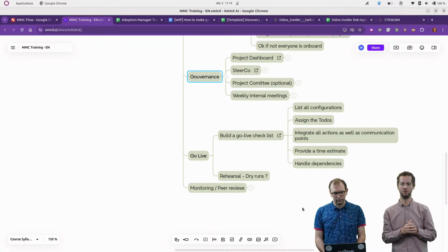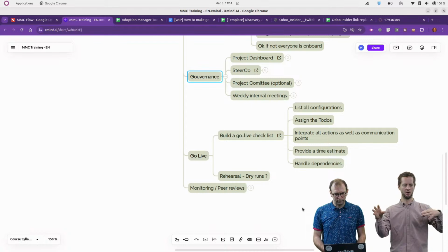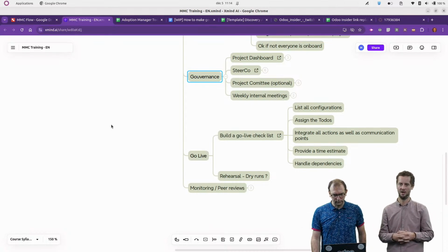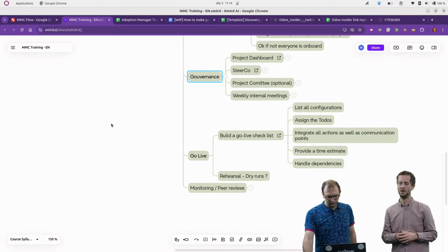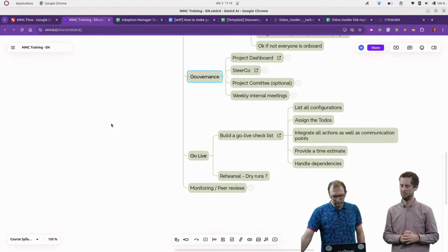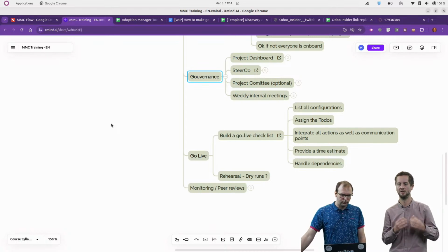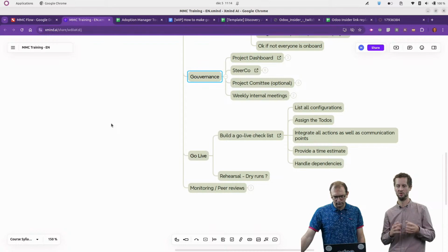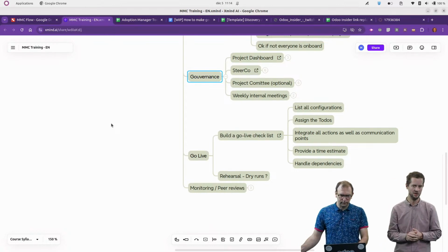On our side, we try to onboard 1 or 2 extra resources depending on the client location because we want to be efficient. So here in the company in the US, we work with someone with a BA in Buffalo to avoid the time difference, to be able to be on site when it was needed. And here for the client in Europe, we fully handle the project internally. And we also went on site to discuss with the client at some point. And that's the plan to continue on this.